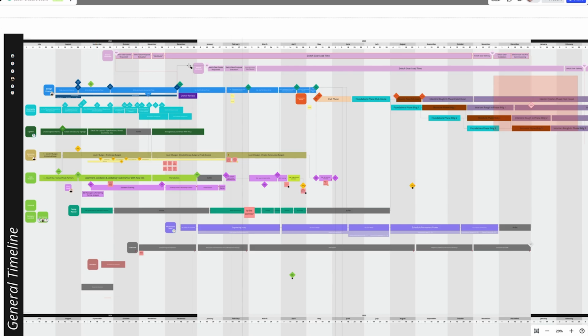Now, we also did coordinate down here when APS would be ready for that, so those were totally in sync. But basically, this first one right here was when we needed it or wanted it, probably more appropriately, and this would be the last responsible moment, meaning we can't release it any farther past this mid-January, mid-February date, okay?